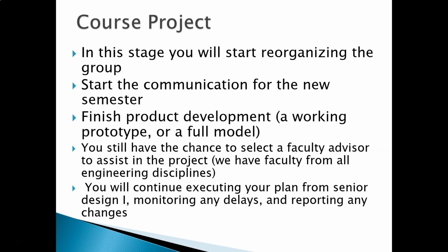Plan to have the product functioning and complete before the spring break. That's it. You're going to be done with the testing, you're going to finish everything, and by spring break, that's it. It's final. There are no changes because you will be done with the testing and you know exactly how your product will look. So after that, you just need to find the cost, the mass production cost, the resources required. You need to look for the regulations and policies that your product should adhere to.